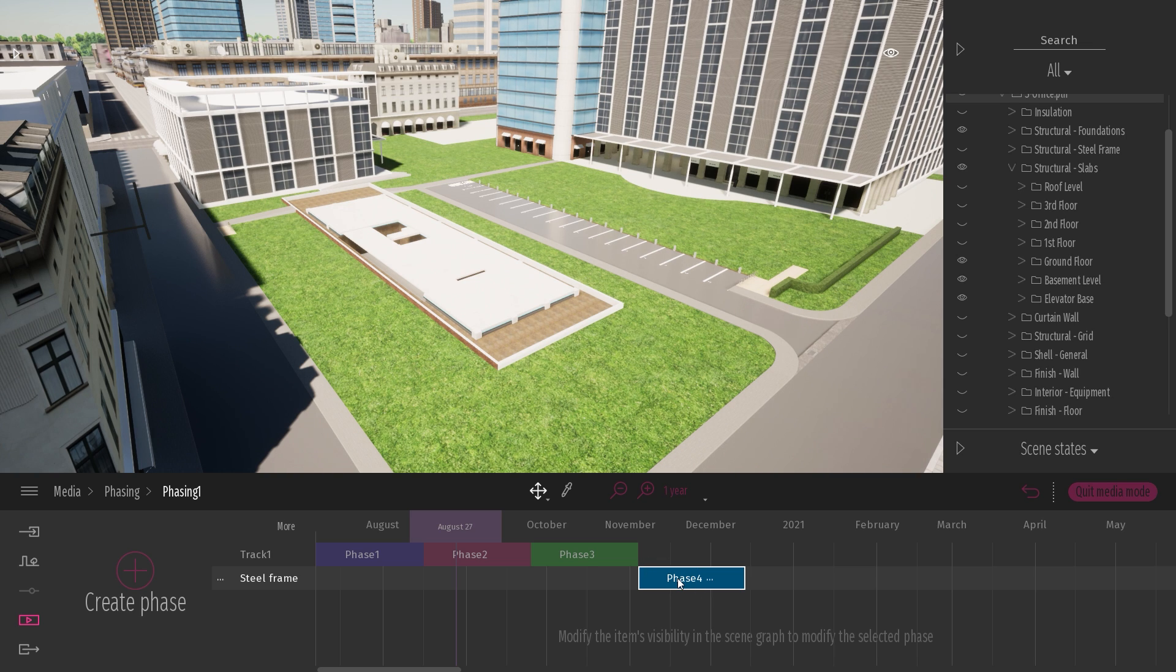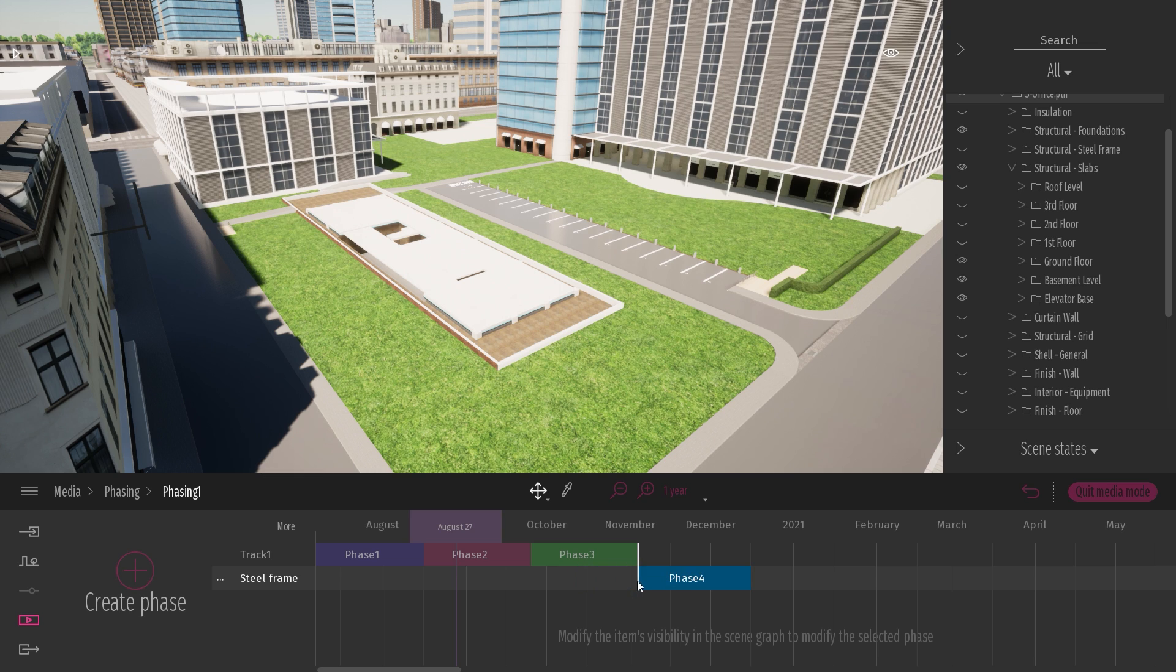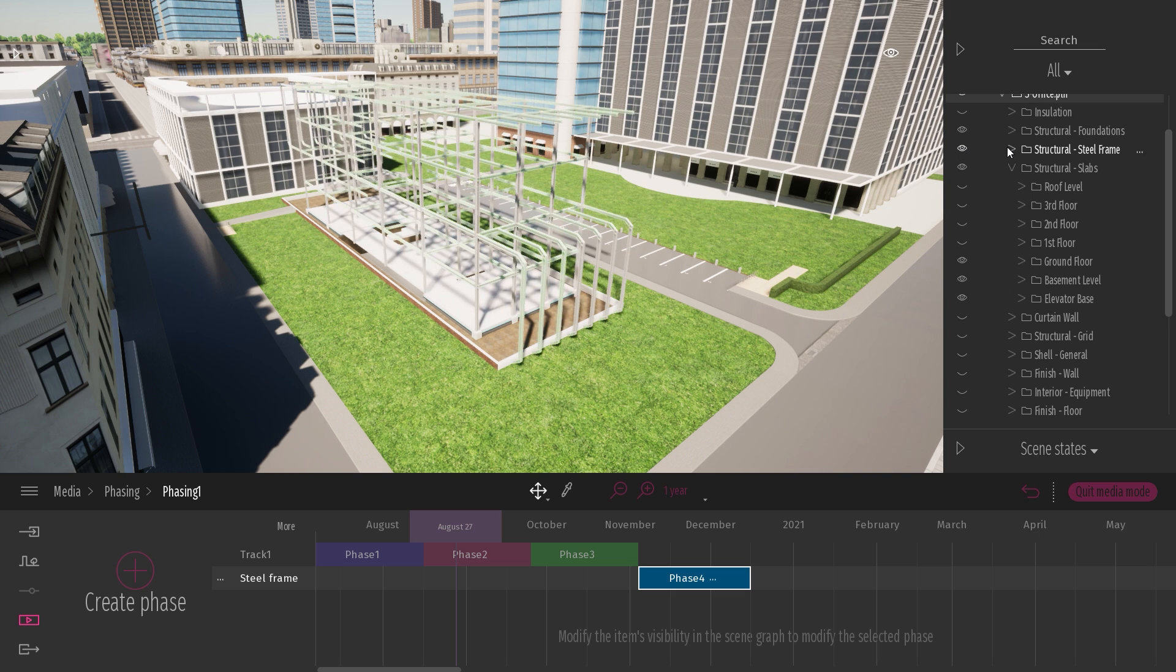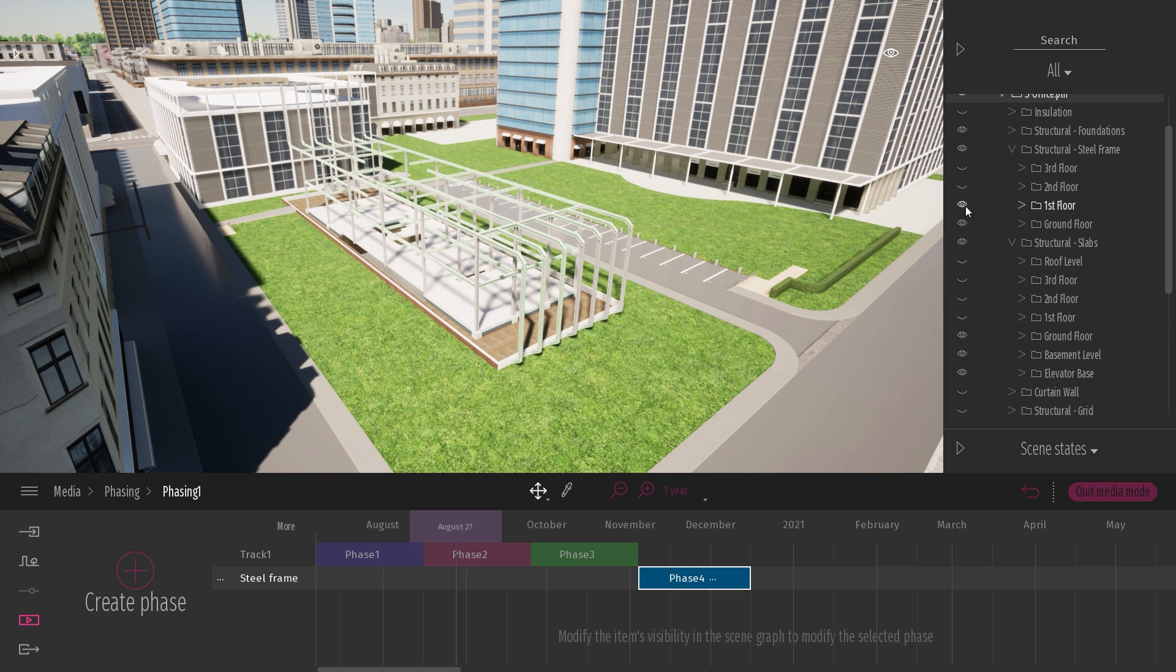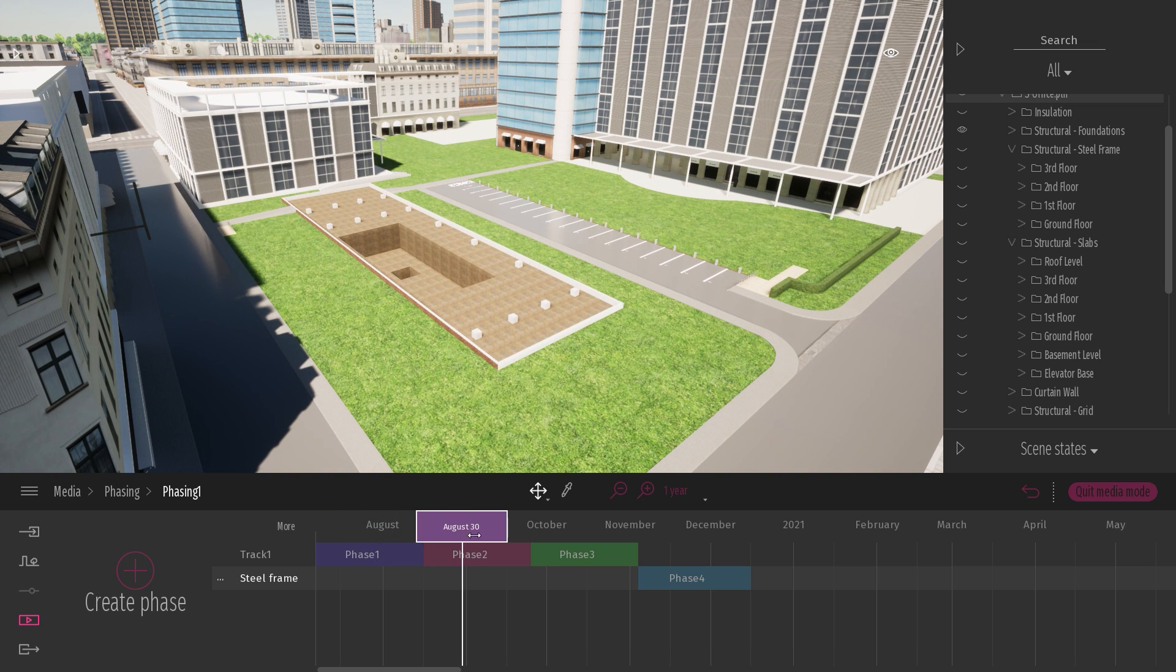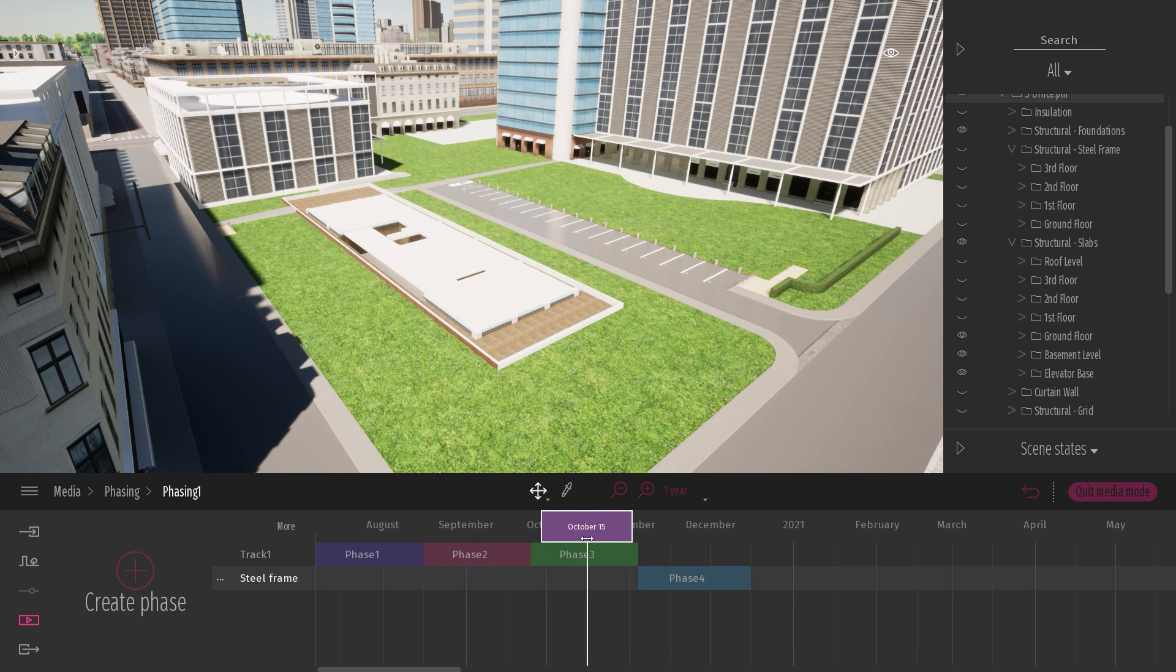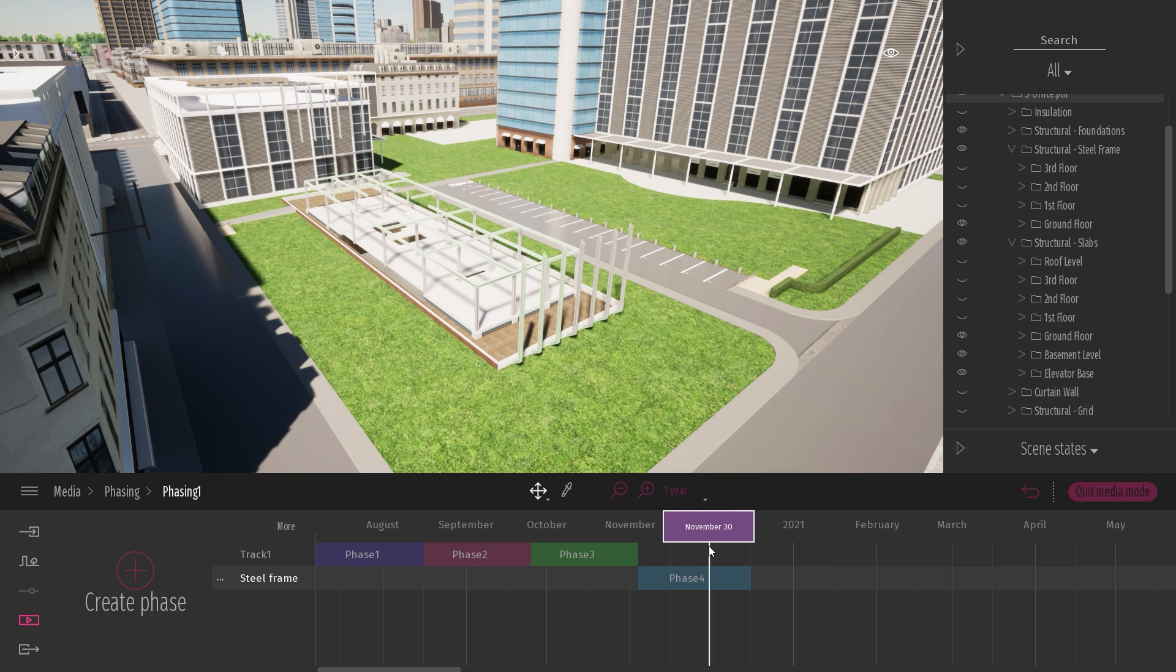So for example, by default, a phase is 40 days, but you can also change the length of a phase just by dragging the end or the start of the phase itself. So in this specific phase, what I want to do is start to visualize my steel frame. And I will start with my ground floor like that. So now I have my hole, the foundation, the start of my slabs, my steel frame.